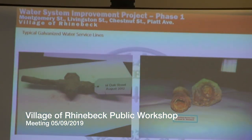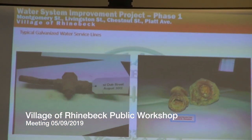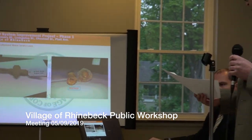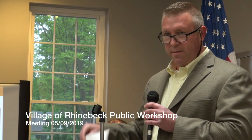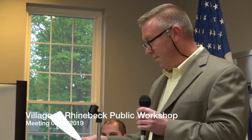The final decision and the final verification of what type of line might go to your home will be made during the construction process. As I said, the village tried their best through interviews and through the records to identify copper or galvanized, but in some instances, it might not be spot on. So the contractor will be charged with excavating to see what type of service line material you might have.